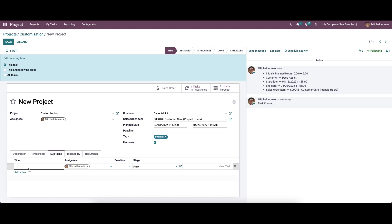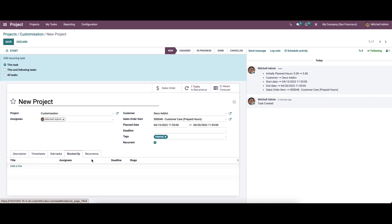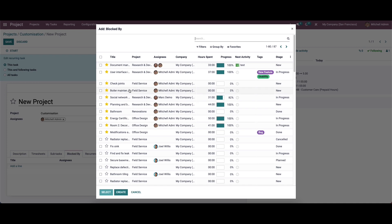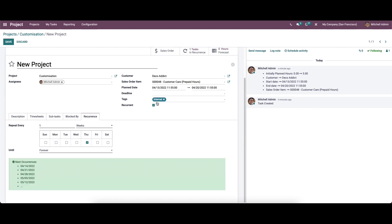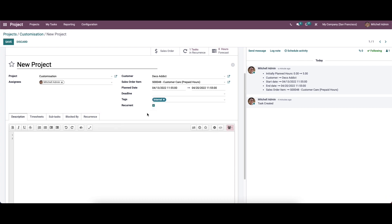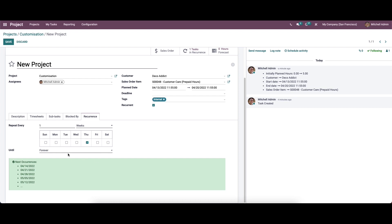After providing all the details, we have the option to view the task and also remove the task. In the 'block by' tab, we can add the list of tasks that we want to block — while clicking on 'add a line,' a window will appear from which we can choose the task that needs to be blocked. In the recurrence tab, which appears only after enabling the recurrent option in the creation form, we can select the days on which we want to repeat the current task. The order will display the details of the next occurrences according to the selected days.